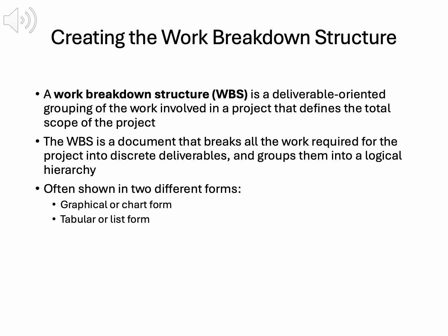Work packages are deliverables at the lowest WBS level, assigned to a single person for management. Each package is detailed enough to estimate cost and duration. For example, the survey administration work package in the training project includes tasks like sending the survey, with clear resource needs and timelines. The WBS is a foundation for project management, guiding planning, resource allocation, and control.